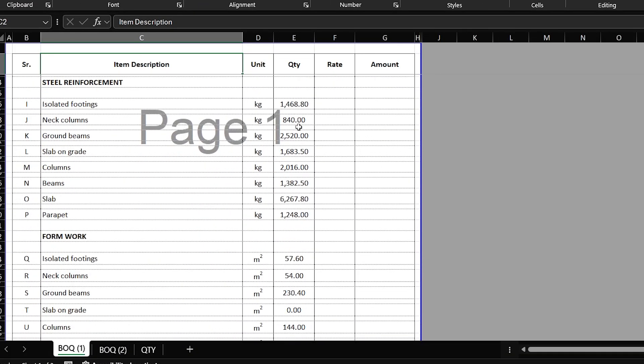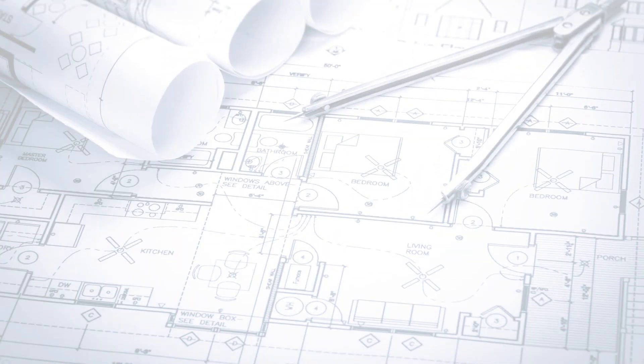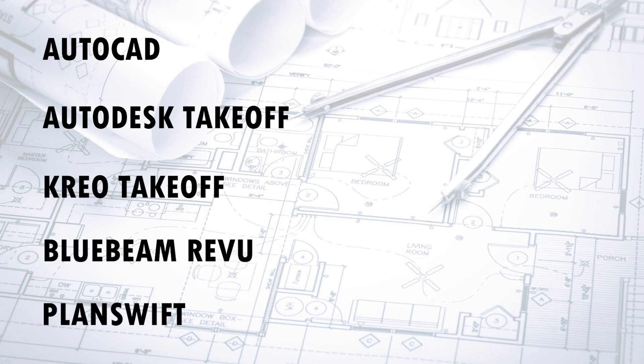Step number two is quantity takeoff. At this step, you will have your BOQ with all the items defining your scope along with their units of measurement, and you will start measuring the quantities for these items from the drawings. You also need to decide on the tool you will use for measuring quantities. There are many tools available — AutoCAD, Autodesk Takeoff, CostX Takeoff, Bluebeam Revu, PlanSwift — and you need to decide which one to use in order to produce accurate results.